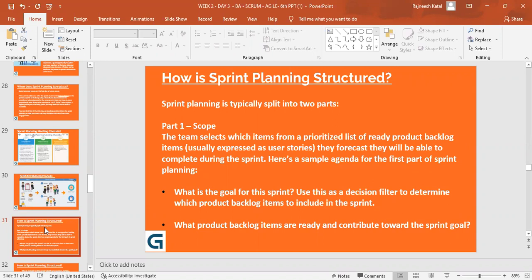Yes. So what is the goal for the sprint? Basically, the prioritized set of requirements from our product backlog will ultimately be your sprint goal. If you have 100 line items in the product backlog, and we decided to work on the 25 high priority ones which the customer asked for, then achieving those 25 and delivering that functionality is your sprint goal.